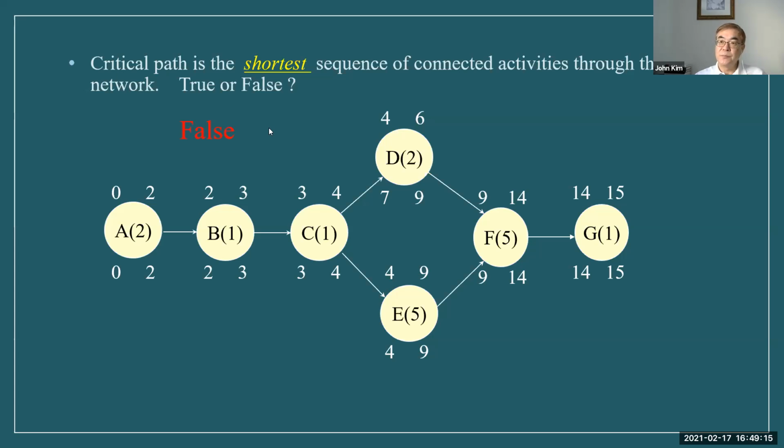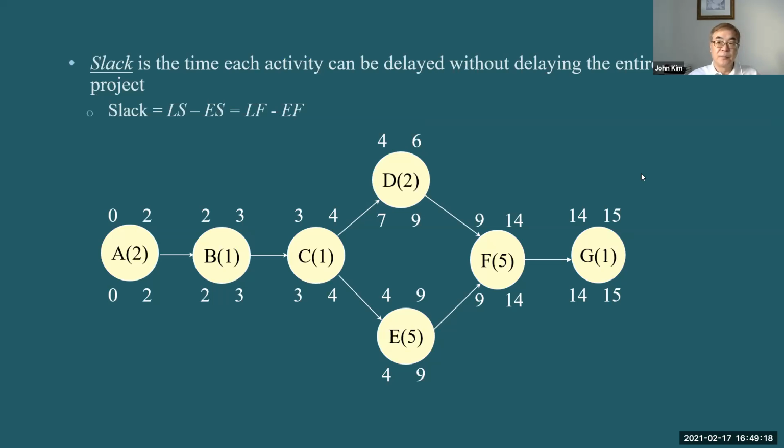Okay, next one. Slack is the time each activity can be delayed without delaying the entire project. Here, slack equals late start minus early start, or late finish minus early finish.